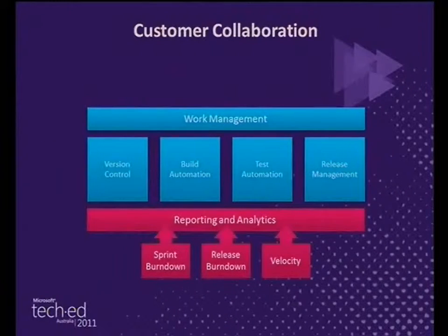One of the things we do fairly religiously with our software development projects is when we provision a project and start doing software development, we automatically set up the reports now. And we do things like email the sprint burn down to the customer every single day. Who would like to expose their slipping schedule every single day to the customer? All right, it's pretty nervous. But it's amazing how much it focuses people on reporting accurately inside the systems about how they're progressing. Because most people want to impress upon the customer how well the team's working. So we create that feedback cycle.